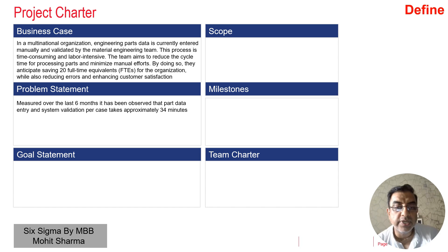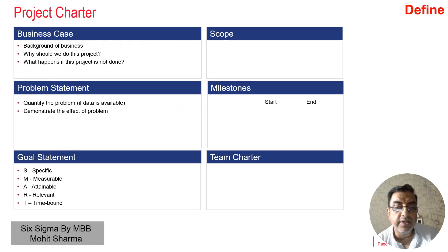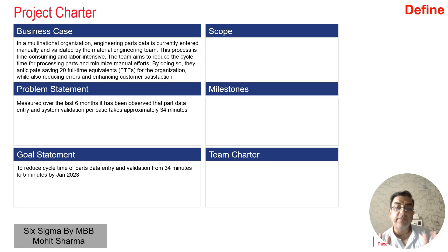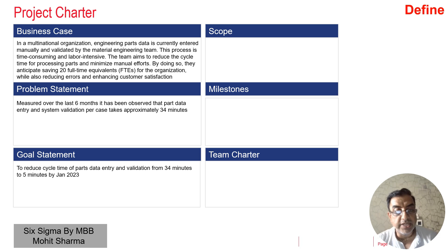The next element is the goal statement. A goal statement should be specific, measurable, attainable, relevant, and time-bound — that is, SMART. In this particular case, the goal is to reduce the cycle time of parts data entry and validation from 34 minutes to 5 minutes by January 2023, which is a SMART goal statement.